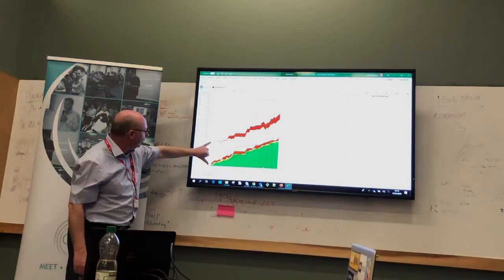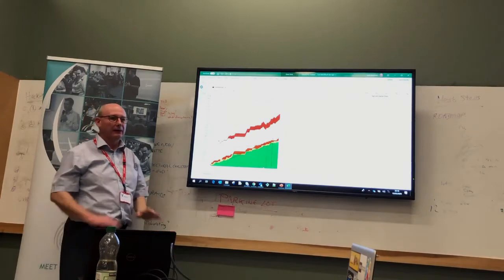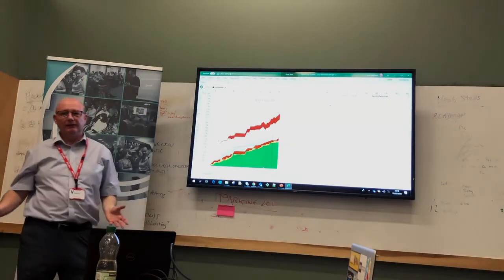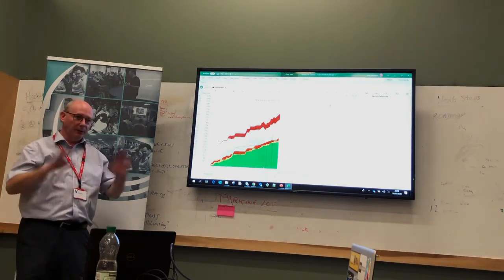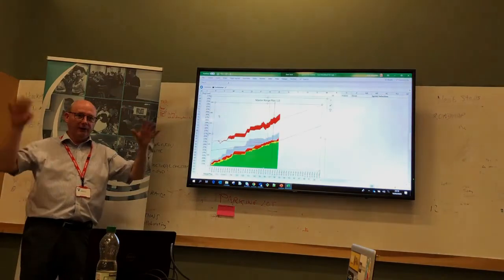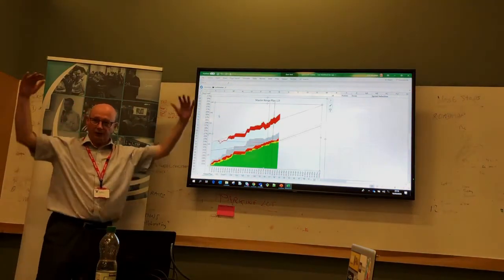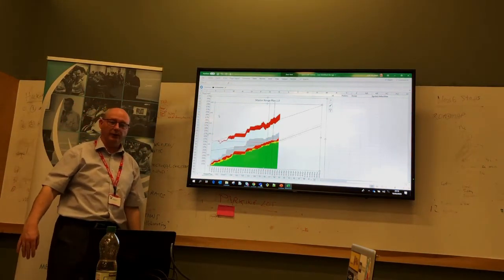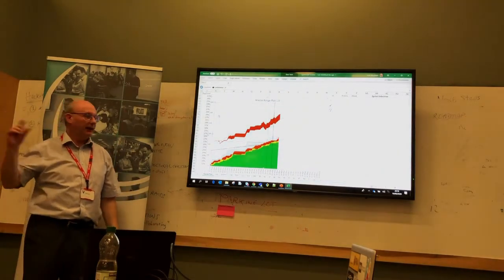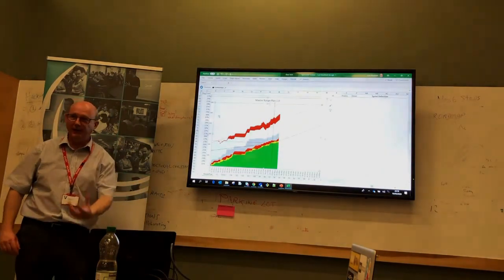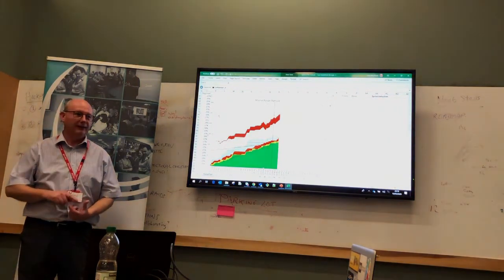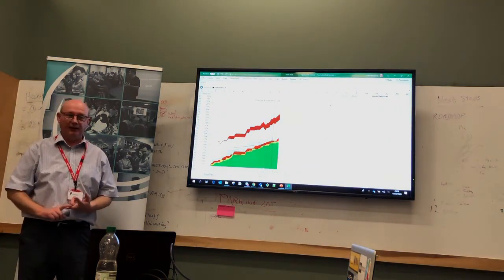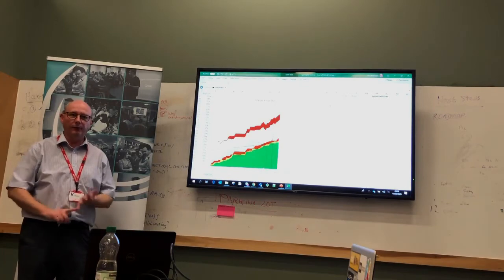We initially started off with 203 points, and we story mapped it into the broad areas of what we were doing, and then we put all the stories in priority order, and then we said, okay, we know it's an MVP, but let's deliver it agile. Let's have release 0.1, release 0.2, release 0.3, and 0.4 and 0.5.